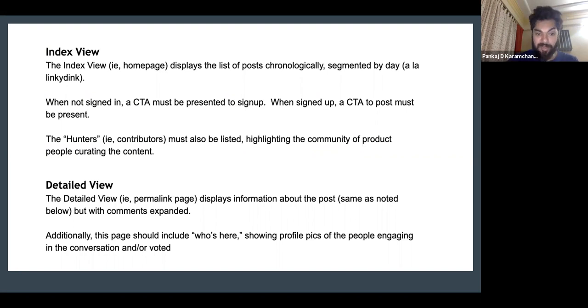You need to get feedback on those mockups and iterate, make different versions of it. Finally, when everyone is happy, you make a full-fledged mockup or an interactive prototype. Once that is available, you can even work on your PRD. So you have 2 weeks to do this so that when the next sprint starts, you are ready with the design and the PRD to be given to the developer. So you are always one sprint ahead of the developers.